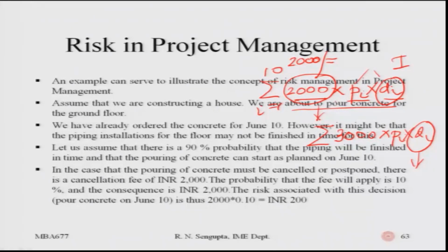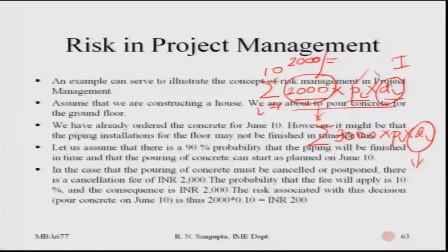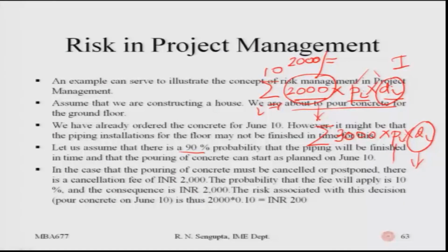Next, consider that the probabilities are changing, which is absolutely possible, considering that the delay probability of 90% I mentioned was for the first instance. But it may so happen that due to the non-arrival of, say, the cement, or a problem with the cement mixture, or different types of problems which I mentioned, the probability may increase or decrease. In that case, even though I have used the symbol Pi in both cases, the values of the probabilities would be different.